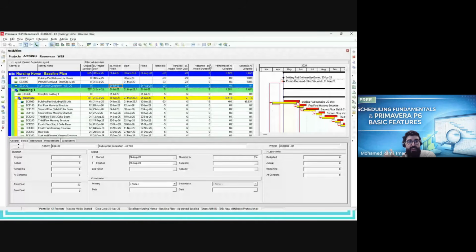It's not wrong. What he's doing is correct. He is earning a real progress, but he is working in non-critical activity, and he is keeping the critical activity delayed, which will push the milestone at the end. So the conclusion: you have a positive progress since you earned progress from non-critical activity, and in parallel you have good CPI and SPI, because it's a simple comparison between budgeted, earned and planned. But from a schedule perspective, your critical path is delayed because you are not making good progress in the right path, the critical path. This is the importance of the multiple path analysis.